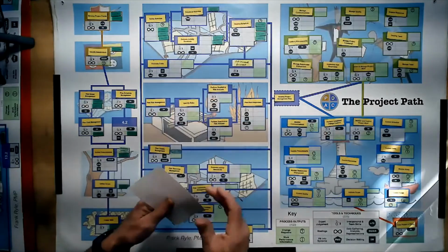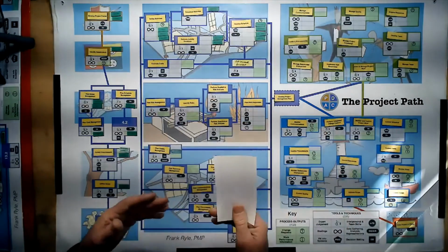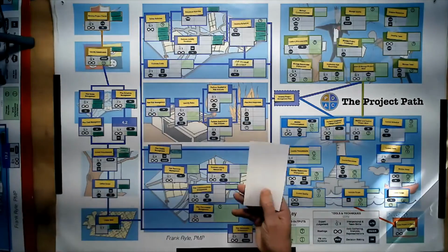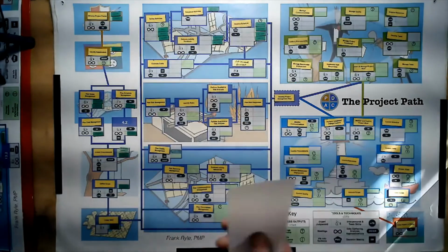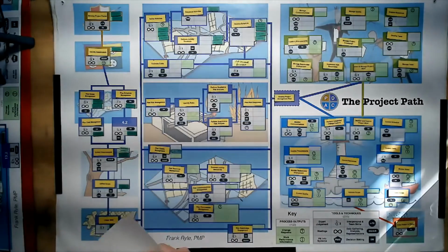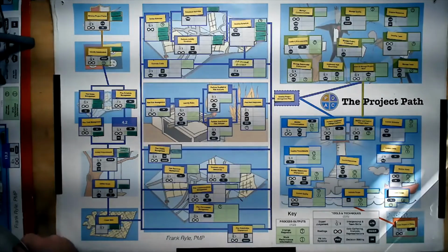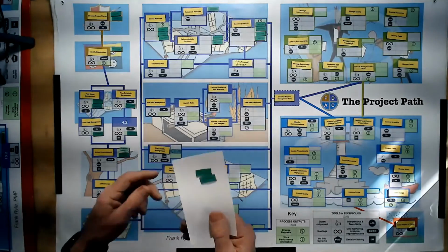So project calendar is very important, not the resource calendars. We don't know the resources yet, but we do know that the project will happen over Diwali or Ramadan, over the winter, or whether it's the winter in the Southern Hemisphere. We now know the project schedule, the project calendars.